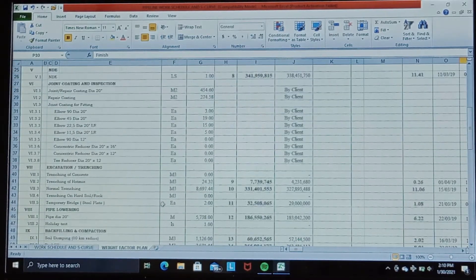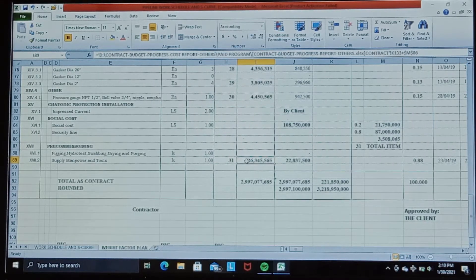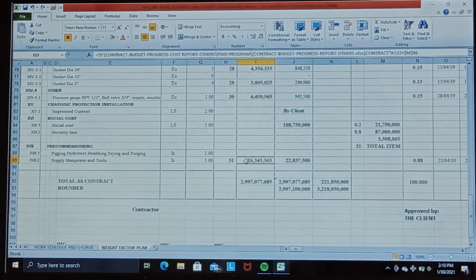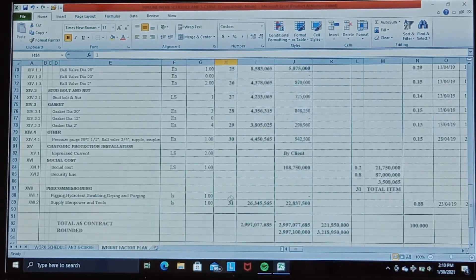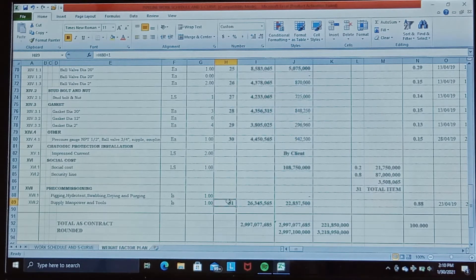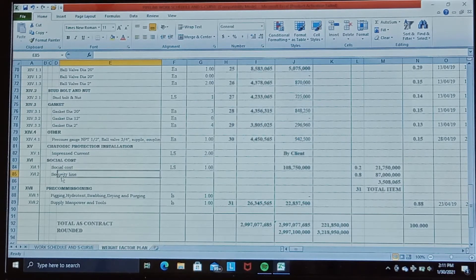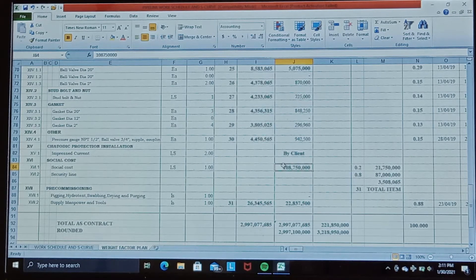Beginning with this worksheet, the total contract for this work is 2,997,077,685 rupiah. The total contract is spread over 31 work items, starting from item one through 31.